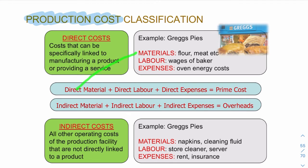Direct costs can be thought of as everything you can see: pick up your pie and you see the ingredients (direct materials), someone in the kitchen working (direct labor), and all the equipment running (direct expenses). These three together give you the prime cost.